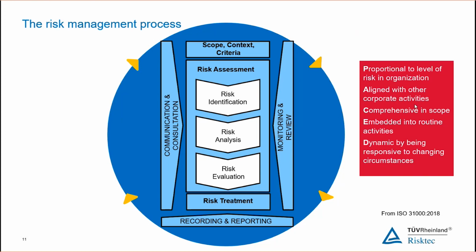Now, everybody likes an acronym, so PACE on the right hand side there. The level of risk assessment that we do has to be proportional to the level of risk that we're dealing with. We're not asking everybody to turn everything into a huge great paper chase, but we have to be proportional to the levels of risk that we're dealing with, and our risk assessment processes have to be part of what we do within our organization.